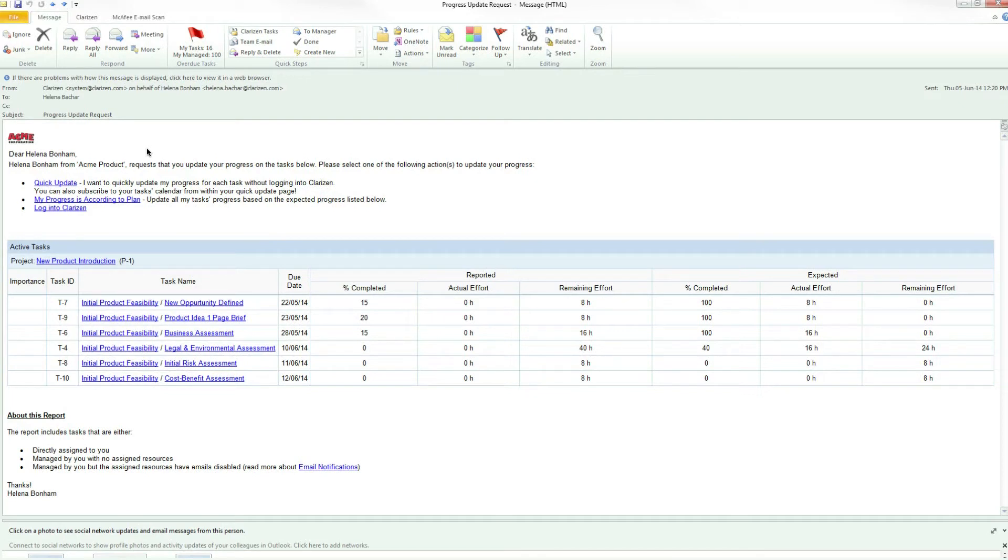Either by clicking on My Progress is According to Plan, which means that the actual effort will be equal to the expected effort, or by clicking the Quick Update link.